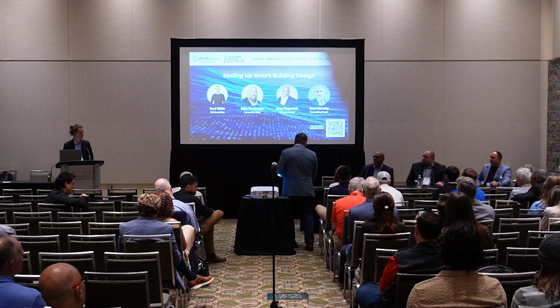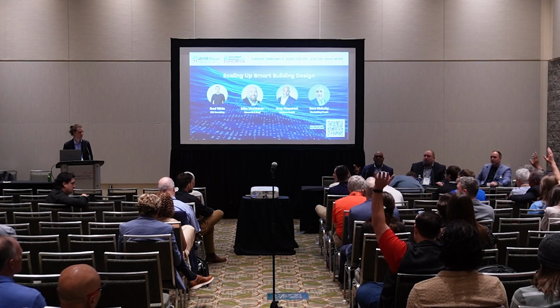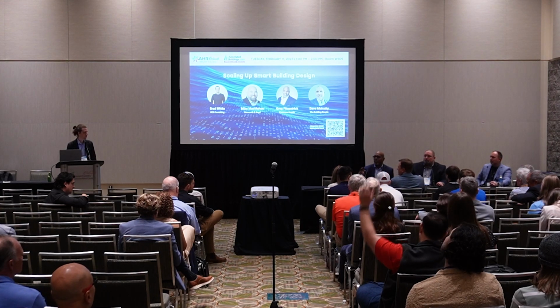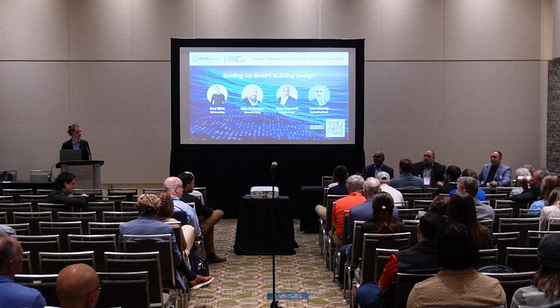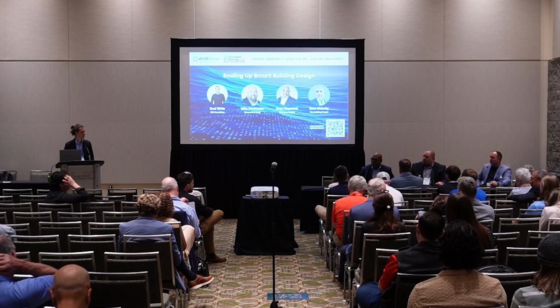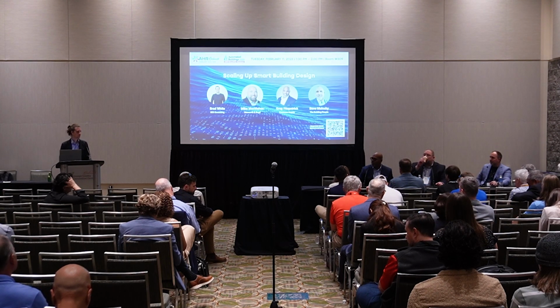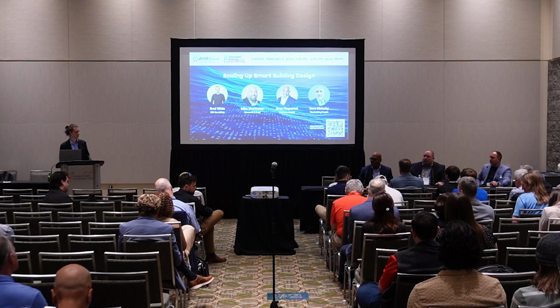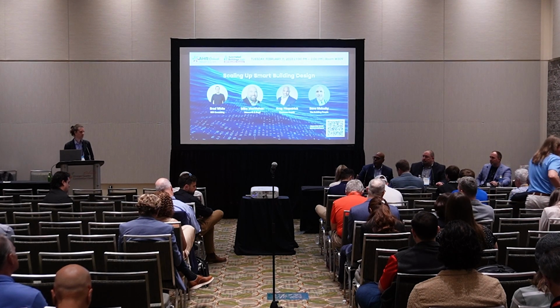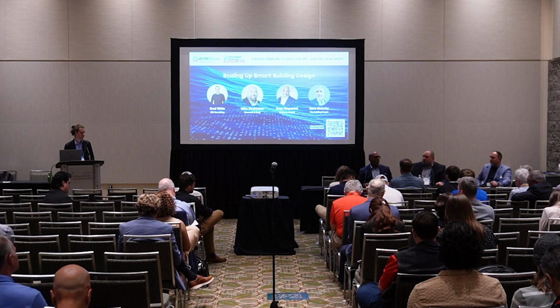What we've been promoting is the use of Division 25. How many ME firms in here are using Division 25? How many MEP firms are not using Division 25? It's called integrated automation, right? And that's what we're trying to promote, the use of integrated automation, so that all of these disciplines involved in the integration process, lighting, energy, it can be elevators, right? They all point back to Division 25. They all point back to that systems integration drawing, so that each one of these disciplines knows their roles and responsibilities in the integration process.